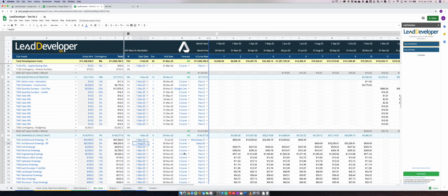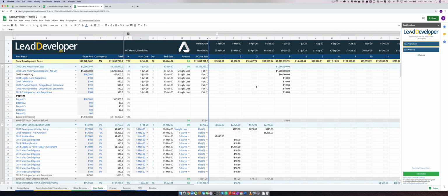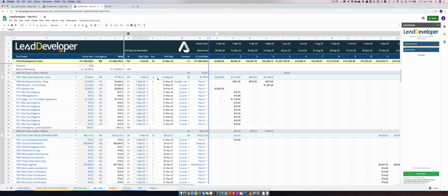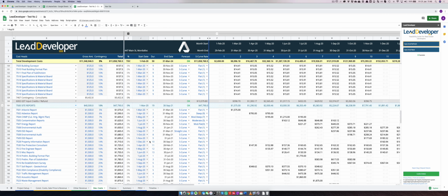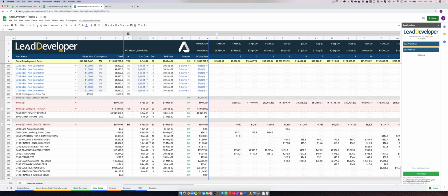That would include you settling on the block of land. That would include you settling on loans or paying costs or whatever, because the bank is only going to pay you a certain amount of your total development cost or a certain percentage of your total sale value, and so on. And we'll discuss all of these things in the finance section, which is the most important section of all of this. Now, development cost was very, very important. It's super important, but this is the most important, and we'll discuss that in the coming videos and so on.